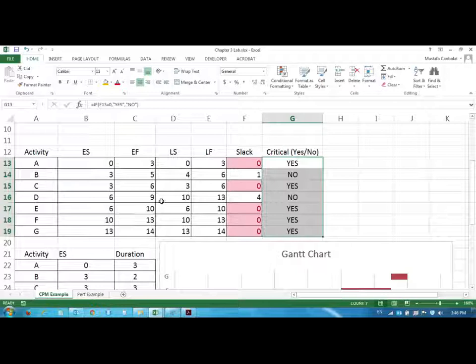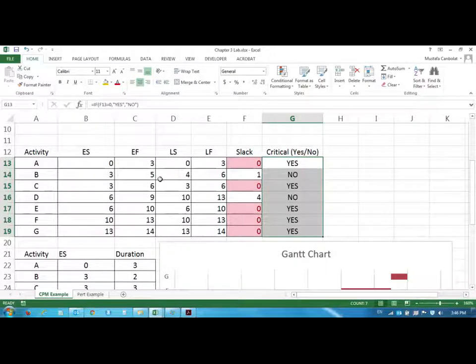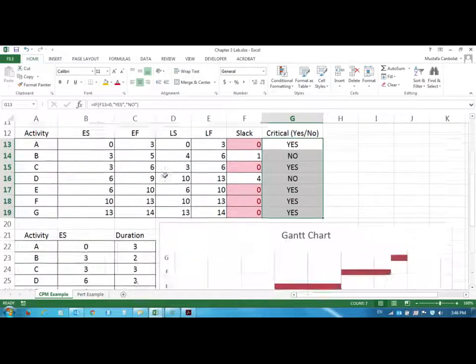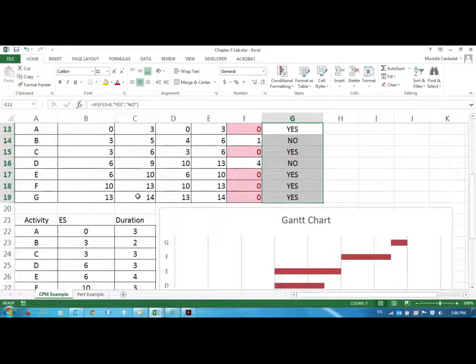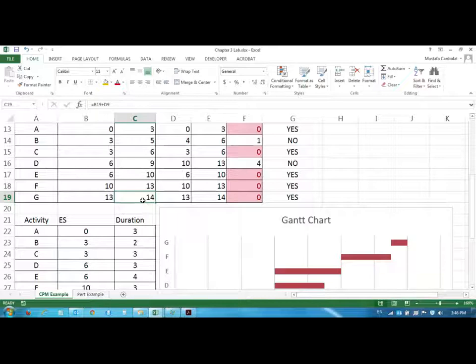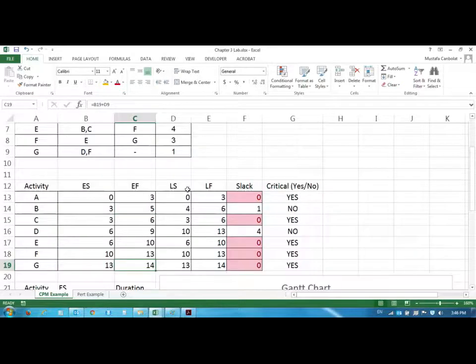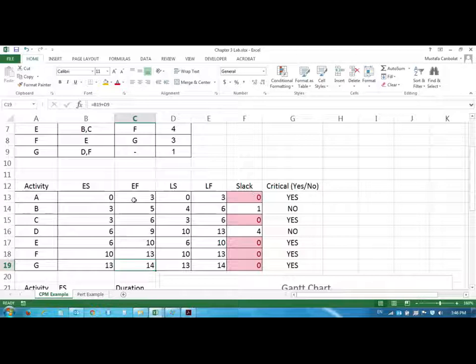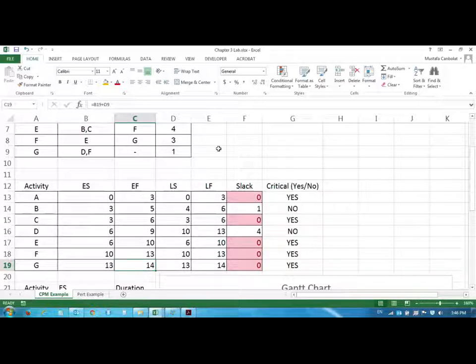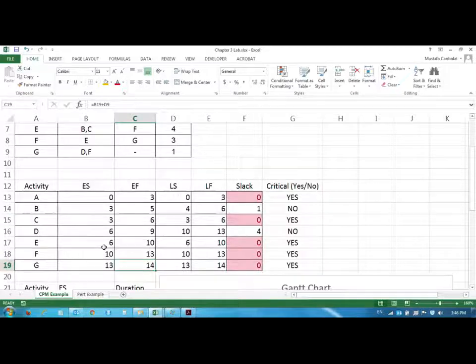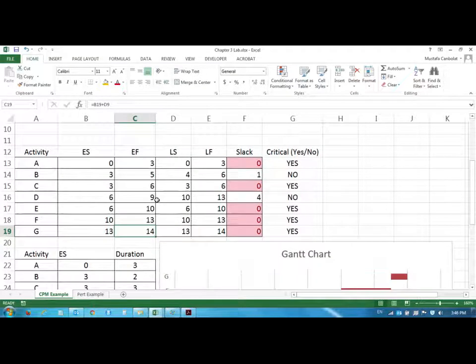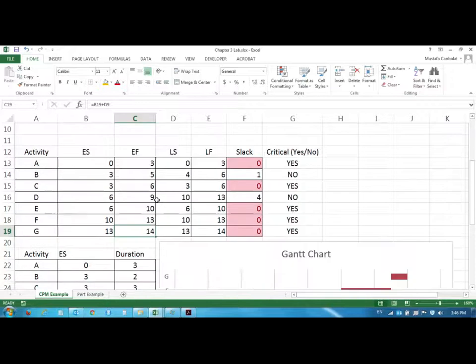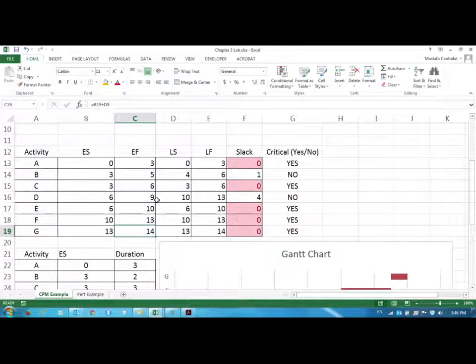So what we have done, we have found the early start, early finish, late start, late finish values. We have found the project completion time. We have found the activities that are on the critical path. And you can also find this easily using pen and paper as well. And please refer to the textbook. Just look at the longest path and you can identify the critical activities using that approach as well. And so everything is done here.